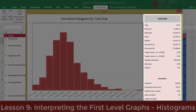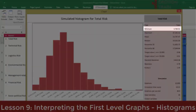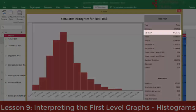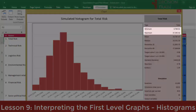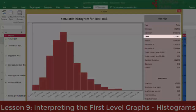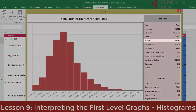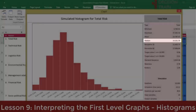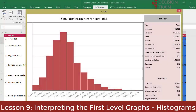With 10,000 simulated iterations, the lowest possible total risk value is approximately $4,800. The maximum value is close to $38,000, causing a variability range greater than $33,000. The mean value is slightly under $14,800, and the median, or 50th percentile, is $14,300. The degree to which the mean and median data are much closer to the lower limit of $4,800 than to the upper limit of $38,000 speaks to a relatively high skewness of the simulated curve.